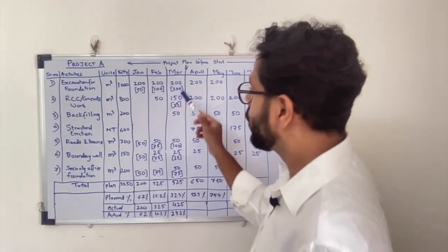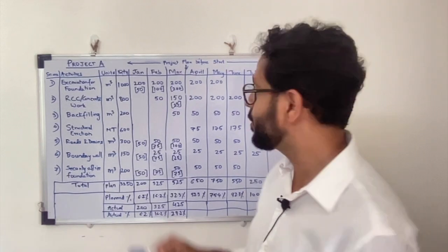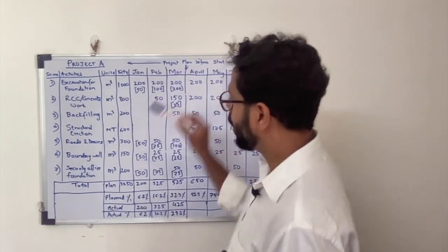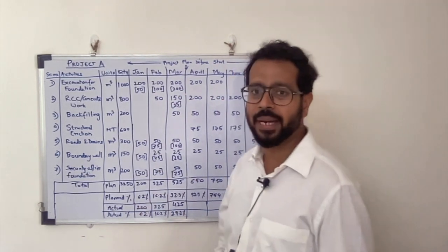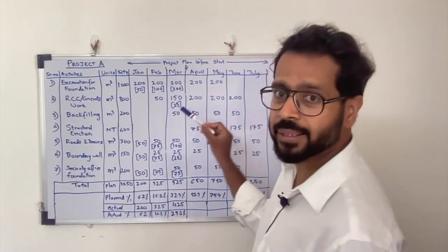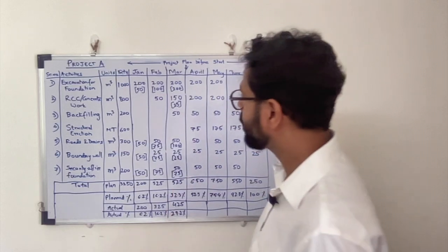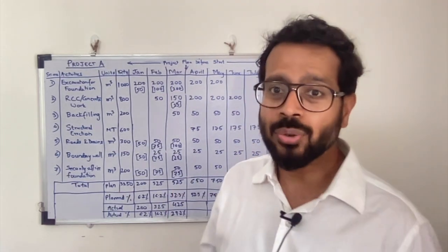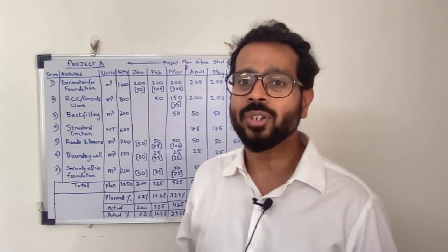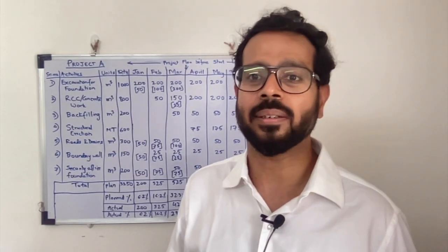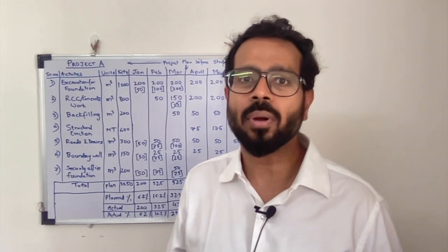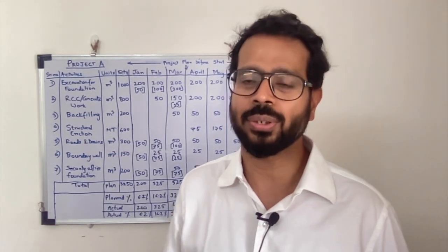That is about 25% variance from what was planned. In activity number 2, around 200 units was planned, but what the contractor has achieved is 25, that is a variance of 22%. So you see the variance in your project is not 3% but much more. S-curves do not provide this information to you.